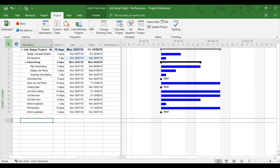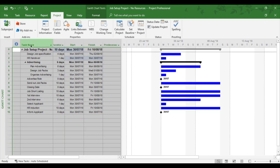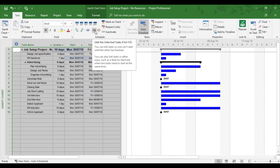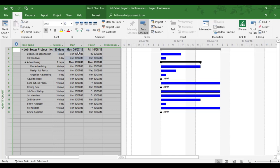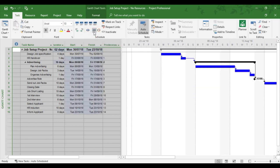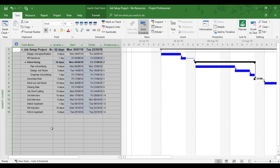Now the way I'm going to do that is highlight all the tasks, which is the top left of the table. So all the tasks are now highlighted. Task tab. And there's a little chain that's called link the selected tasks. Now this is going to link them all together. And that's going to give me a summary duration of the entire project as it stands. So link the selected tasks. And I've now got a 62 day project showing all the durations added together.